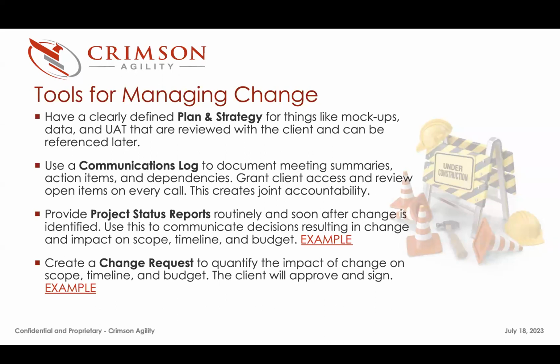Maybe we had our own integration development tasks as well, but we should tell the client, hey, a small part of this is designed to provide guidance, support, and validation of the integration solution. We're not doing it. The third party is responsible for the bulk of it, but we're providing that role, and this many hours. And once you've logged more hours than was allocated to that, then you tell them, hey, we have had to interact with Folio 3. I'm using an example from one of Patty's projects. We've had to interact with them a lot more than we expected, right?